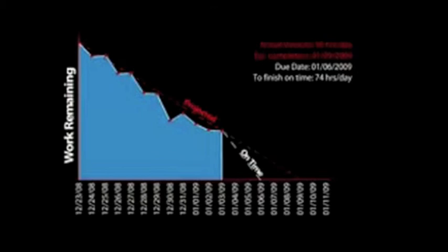It's brilliant because it communicates a massive amount of information in just a few seconds. At this point, one question you might have is, what do we do about these little guys? Bugs come up during the development of every product, and while there is no way to avoid them altogether, there are some best practices on how to deal with them. First, it's a good idea to track bugs separately from features in their own defect backlog. And during a feature sprint, any bugs that are found relating to a feature in development should be dealt with immediately before marking the feature complete. You'll also want to plan at least 1 or 2 sprints that focus only on your defect backlog.